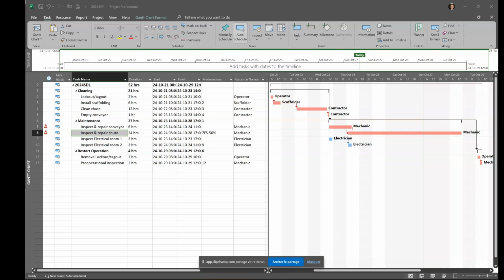Okay, we have assigned resources, but something is clearly wrong because when I'm looking at those tasks, they take longer than I expected. I was expecting, based on my basic option, that they would be working on a 12-hour shift, but it looked like it's an 8-hour shift and they're not working over the weekend. So I can see a day here and another day, so it takes 3 days instead of 2 days if they were working on a 12-hour shift. So let's go to the calendar.